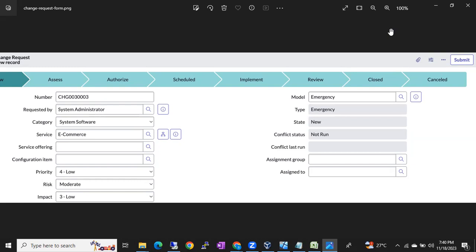In case it's a critical application, some applications will have direct production servers. Some applications will have non-prod servers, then production servers. So if you are patching a production server, before patching it, check whether any non-prod servers are there for the application. Check whether the non-prod servers are patched or not. You cannot proceed to the production servers without patching the non-prod servers. So you have to first complete non-prod servers. You have to give some time.